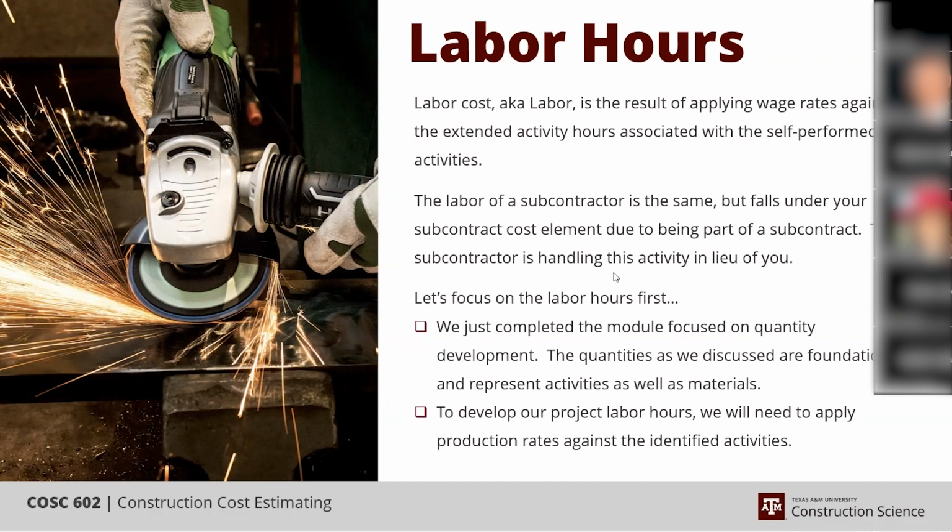The labor hours themselves, or the labor cost, which often is just called labor, is a result of applying wage rates to some development that contains some particular items, and it varies based upon a company's philosophy against extended activity hours. And that extended activity hours is quantity times a production rate times a factor, and that usually stands for or represents the self-performed activities that a company is going to take on.